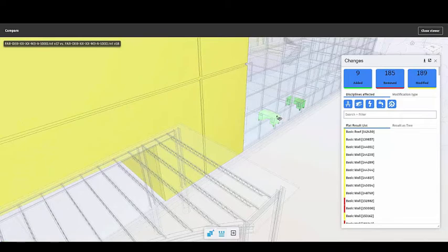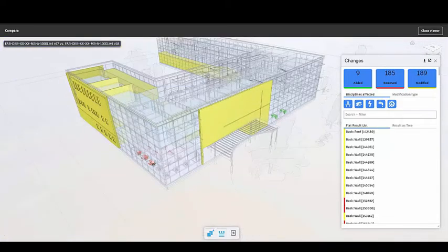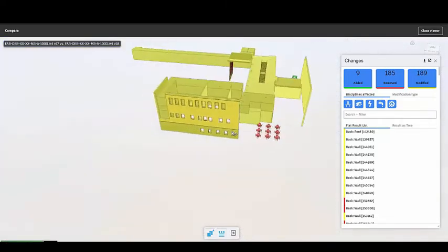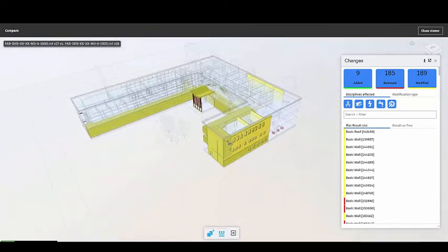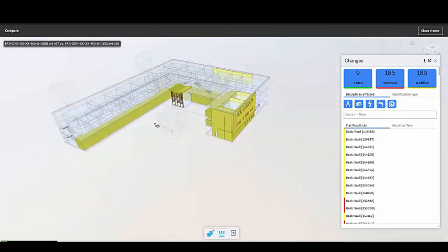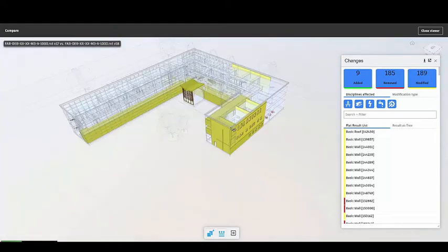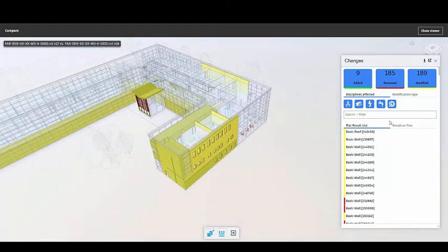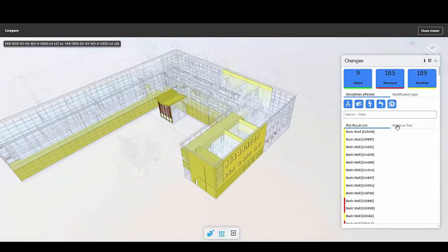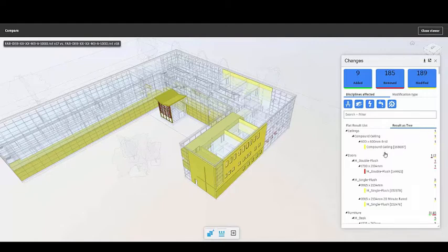We've got a couple of desks that have been added, a couple of desks again that have been removed, but the cladding, for example, the cladding and the windows, some curtain walling there, that has changed. So we can actually see that either visually or on the right hand side in the results as true. We can drill down to the Revit family name and the element ID.